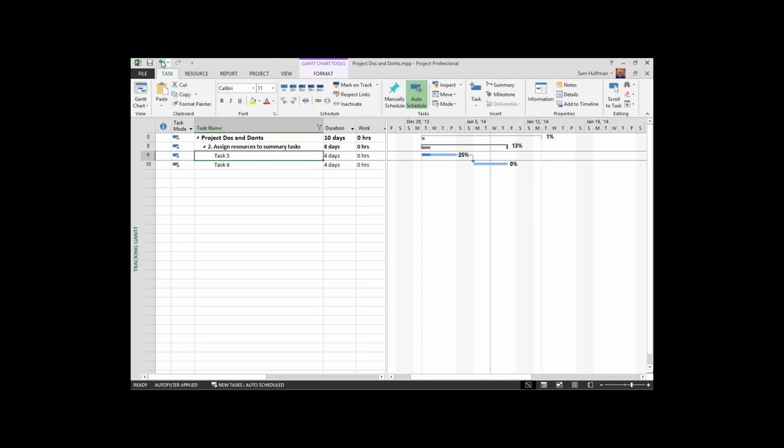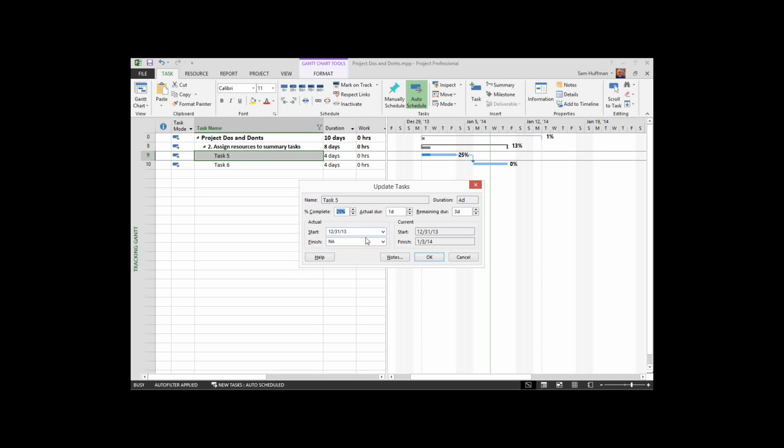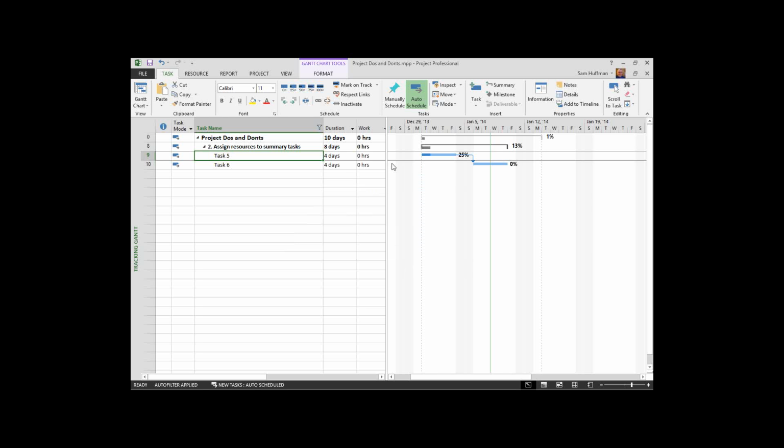That's one way of dealing with this. The other is to update the tasks on a specific date, so you can begin to watch your completion having an actual start date that's different than a baseline start date, and so on. And last but not least here, you can create your own break. So I might use the break button that's in the schedule tab and simply break a task, move that task forward in the timeline to when I want it to start, and move forward accordingly. So there's several different methods here of moving your incomplete work into a future date, but bear in mind that those are going to have schedule impacts, and this is the portion of the tool that's designed to show that to you. So Cynthia, I hope you got all that.